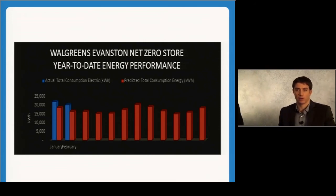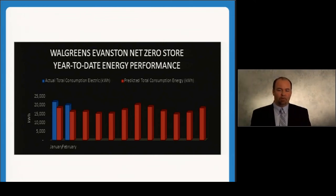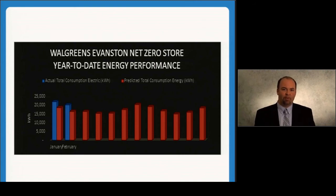So you've seen a lot of information about what we've done to not only design the building, but monitor all of the complex interactions that go on inside the building. And what you see in front of you are our first 2 months of data. As I mentioned before, the store opened in November. We had a very quick time frame to build, so lesson number 2 learned, don't commission the building after it opens. Try to commission it before, but because of the timeline, we had to commission after. So our data for December is pretty jumbled because of the commissioning that was going on.